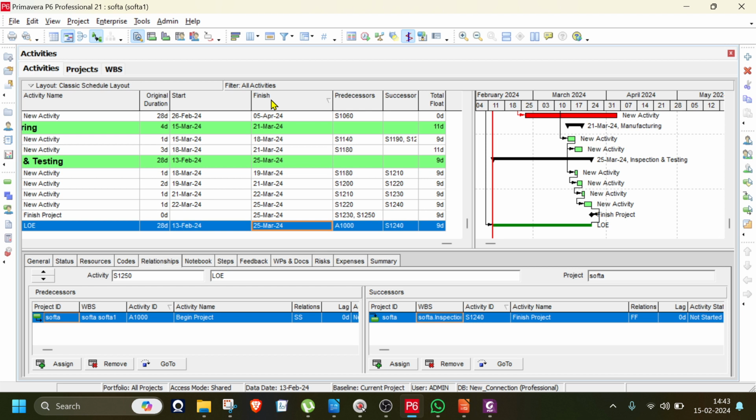So the next question might be this: how are you going to do that adjustment? I might play around with the constraints. You can adjust the constraints. You can change the constraints. Then the second thing is, okay, the client is taking big issue. Maybe I have to put additional manpower. Some projects we are forced to do that. Some projects we are forced to give them overtime. So this all depends on the circumstances, on the external and internal factors.